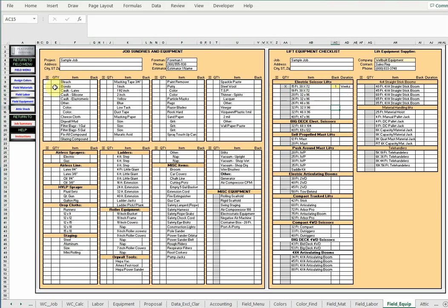The sundries is pretty much by quantity. Caulking, we need 24 tubes of latex caulk. The box here goes yellow. That indicates to the field that we do not let you keep our leftover materials for your side jobs. Whatever you have left over, bring it back. When you put in, we have received 12 of those back, that tells me that that has now been checked off. Very helpful tool in helping you prevent pilferage from employees. I know, none of our employees steal anything from us, right? Yeah, okay, it's just a safety measure in that case.